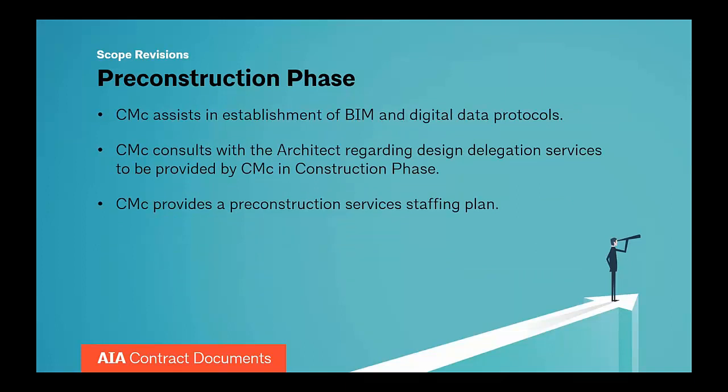Also, as a reflection of what we saw as current practice, the construction manager now is an early participant in developing the BIM and digital data protocols that we just talked about. We're also seeing a lot more design phase input from the construction manager, subcontractors, and suppliers, and a lot of times you'll hear this called design assist. Discussion with the CM during the design phase also can help identify what work will become delegated design through a performance specification, where the final design or engineering is going to be completed by the contractor or their subcontractors. And last, since the construction manager very often is selected based on their proposed personnel, we have added the requirement for an initial and then updated staffing plans throughout the project to make sure we're keeping the staff that we originally saw. Next slide.